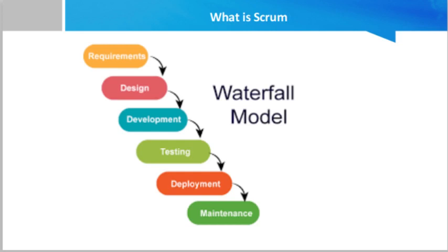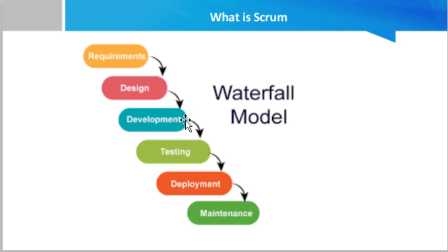The older methodology is the waterfall model. What is the waterfall model? The waterfall model is an approach used for software project management which says that first we gather all the requirements, then we do the designing of the solution, then development, then testing, then deployment, and then post-deployment support. Once the first phase finishes, the next phase starts — it is a sequential approach.